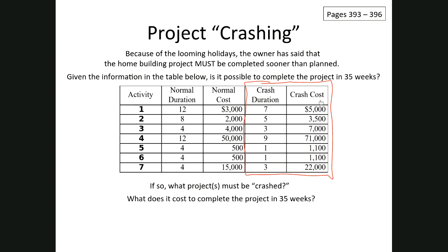So let me explain how these will work. Normally, it will take 12 weeks to complete task 1. But if we work really hard and really fast, it's going to take us 7 weeks to complete task 1.